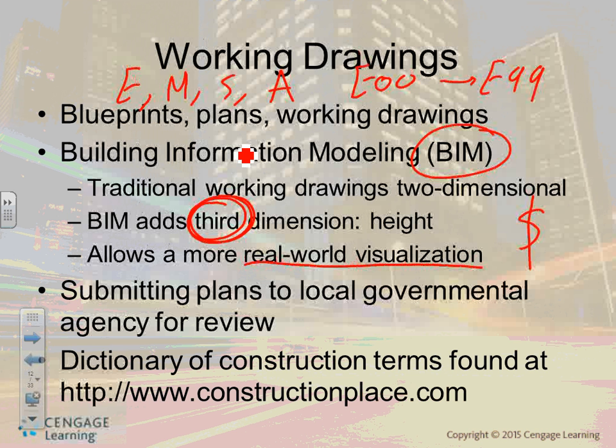Big deal. Your plans and specifications have to be submitted for the most part to the local government, guys. So when you do a hospital or a commercial building, you submit it to the city, typically the city or the state or the county, and their city engineer, state or county engineer will review it, approve it or not approve it or modify it for you. So most of public work and most of public buildings require approval.